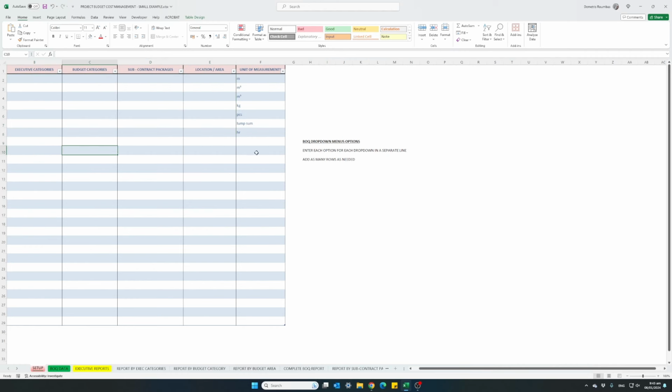1,200 was our agreement, plus another 1,350, our cost projection is 2,550. So the budget is omitted because it's being superseded by the contract. It adds the variation to the contract, and we have our cost projection.